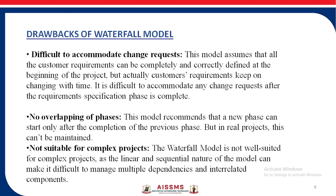The drawbacks of the waterfall model include: it is difficult to accommodate change requests, as this model assumes that customer requirements can be completely and correctly defined at the beginning, but requirements keep changing over time, making it hard to accommodate changes after the requirement specification phase is complete. There is no overlapping of phases — a new phase can start only after the previous one is complete, which can't always be maintained in real projects. It is also not suitable for complex projects, as the linear and sequential nature makes it difficult to manage multiple dependencies and interrelated components.